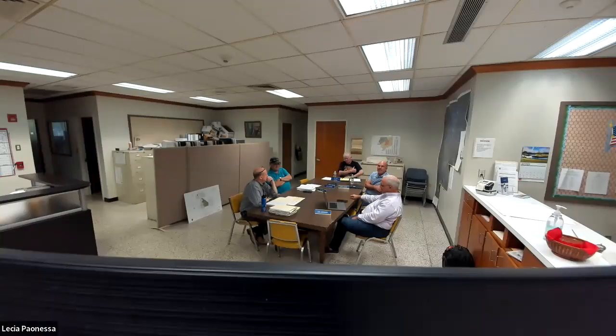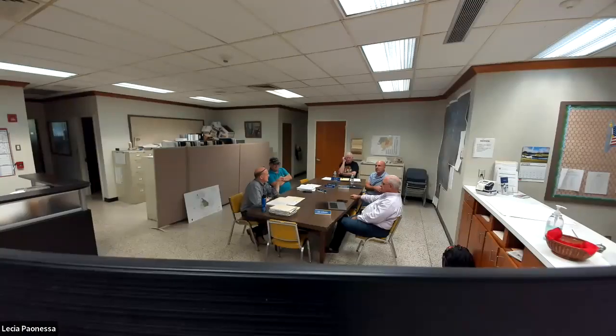Sorry. Yeah, so the plan with the fire alarm contractors, they're going to hang the new devices as they are currently, just suspended from cable wire. We're not going to try to put them in new ceiling tiles. They're going to get destroyed over the next year or so. As long as the fire marshal's okay with that, they're going to position them and work with ASC. You might want to let these guys know that the fire alarm contractor was concurrently working on this, so you had to coordinate with the work on the ceiling tiles and the ceiling demo and all that.